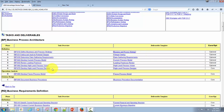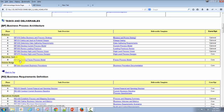Similarly, there is BPAT — Develop Future Process Model — which is one of the tasks that is extremely important during Oracle E-Business Suite implementation. It is used for documenting the client's present model and the future model which has to be depicted in Oracle E-Business Suite. In other words, it details the AS-IS model of the client plus the TO-BE processes which should be executed as part of the Oracle E-Business Suite implementation.